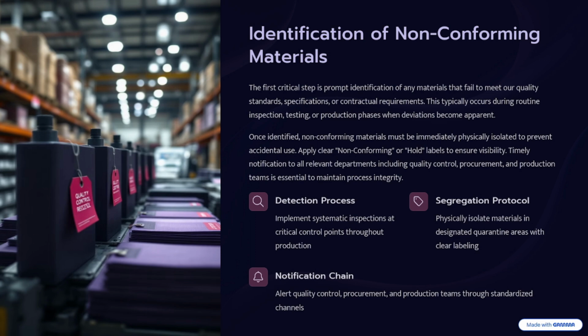This will keep that material in a different yard, and no one can take the material and use it at site. So this is time saving for your supervisors and engineers. It avoids delay, for example when they take the material and then later return it, or they have already installed it at site and then you find out. That will lead to delay in the work progress.